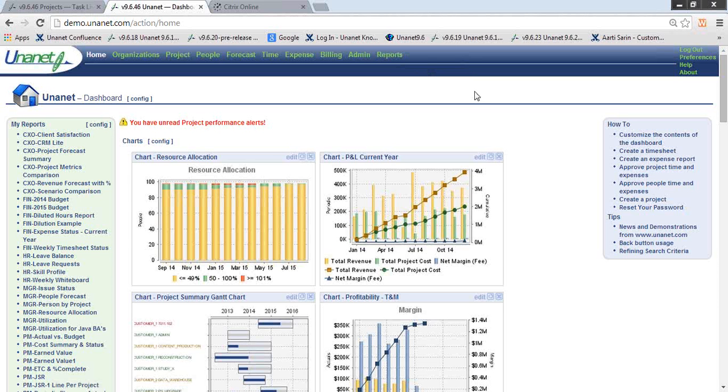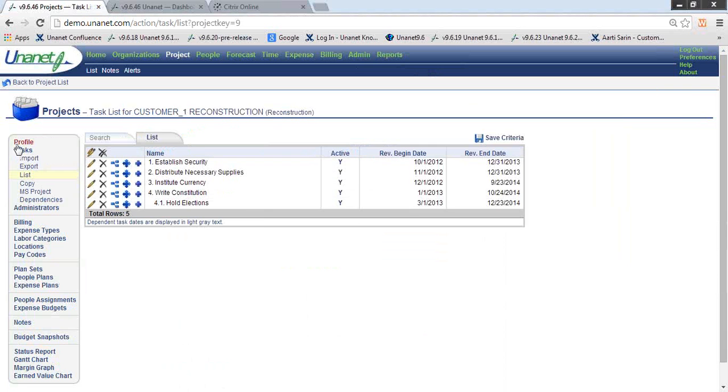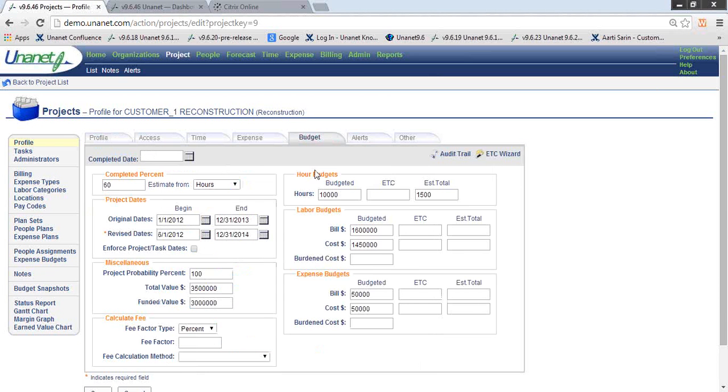I would say allocate your budget of hours accordingly. So set up all your budgets. I would set up your hours budget, your project budgets, your labor expense. If you have budgets for people assignments, set everything up right before you're ready to have folks start charging time and expense to this project. At that point, take your initial budget snapshot. After all your budgets have been established, at that point is when you take the initial budget snapshot. And then set up that schedule to consistently take those throughout the course of the project.